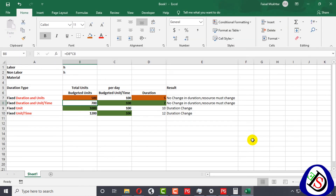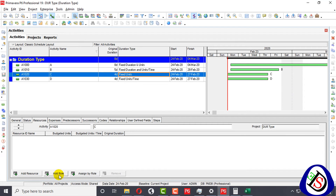Now for Fixed Units. When you know your units are fixed — for example, you have one million or two million man-hours to work — and you know how many units per time you can consume and how many manpower you can apply on a daily basis, you use this type of duration. I will add a resource here in the Fixed Units activity.